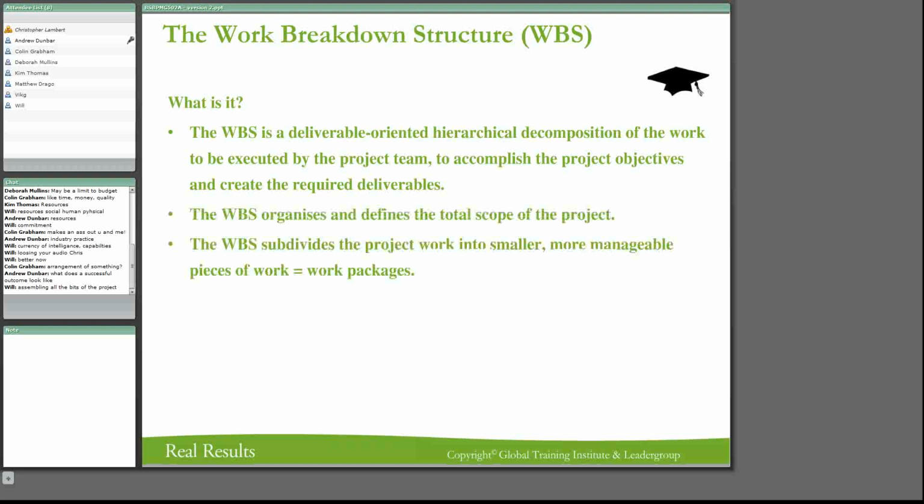And the work breakdown structure divides the project into smaller and smaller and more manageable pieces of work. Right? What we really want to get down to is a very small work group, and perhaps in some cases individuals. So what we want to get down to is manageable pieces of work. If we're building a building, then laying the foundations is not what you want. What you want is even a further breakdown as to how those foundations need to be laid. So it's a small piece of work.